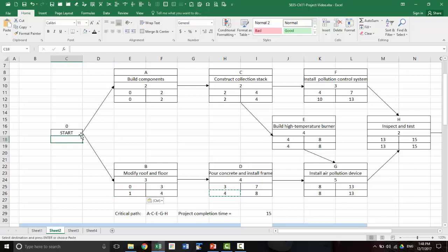Now the start has two arrows going out, so we use min of that and that. So you get 0. When you go backwards, you have to do this min function for the start block too, just to make sure that everything is okay, because if this min is not 0, that means you made a mistake somewhere around here. When we go backwards, we have to go back to 0 for the start block.